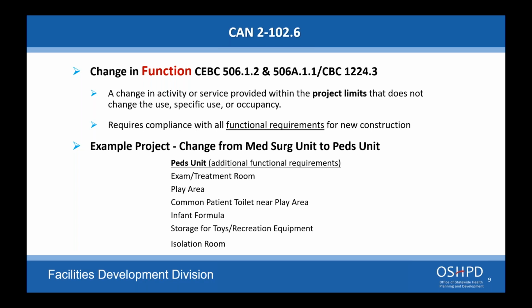But again, if there are existing conditions affecting that generator, such as the location, if it was installed in compliance with the previous version of a code, it does not need to be altered to be brought up into the current code.